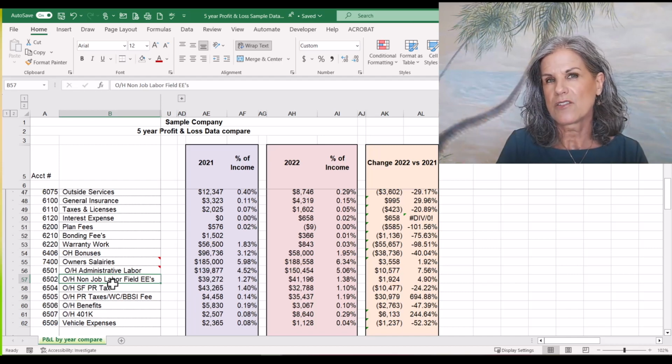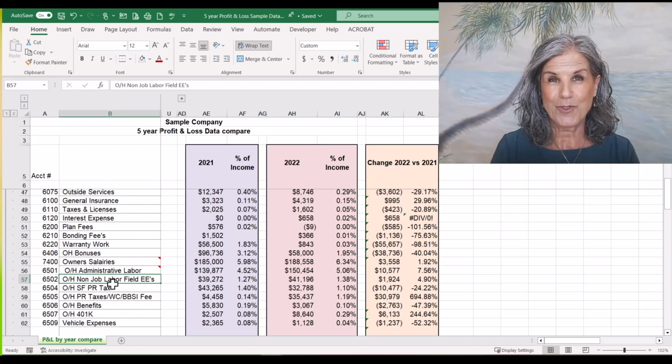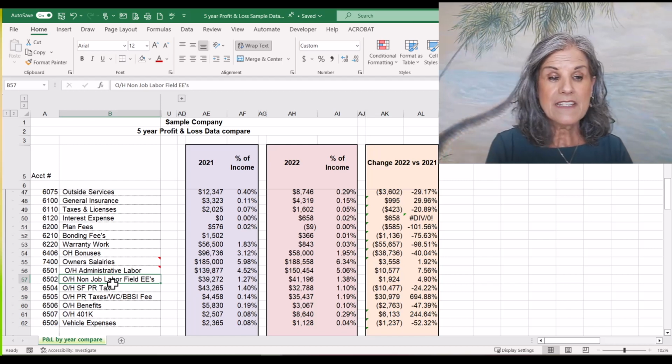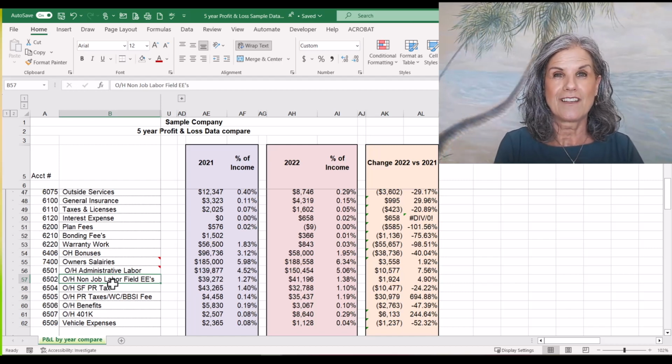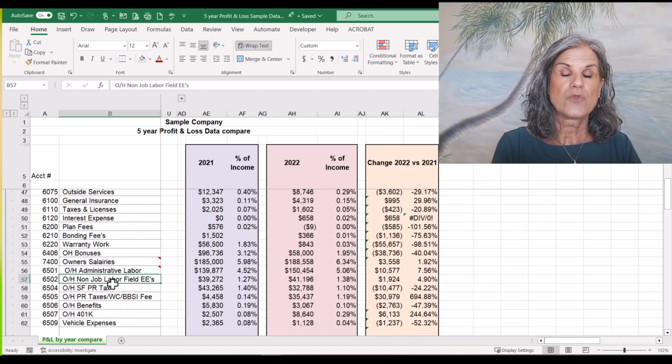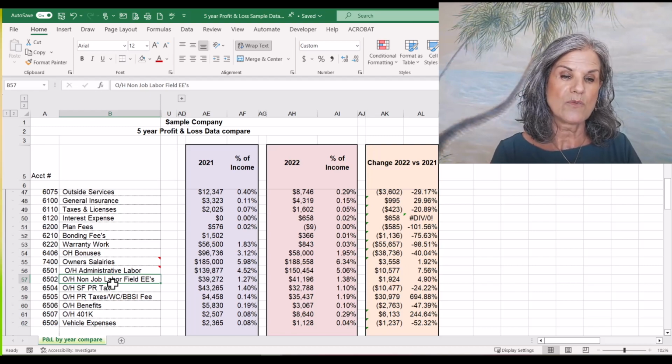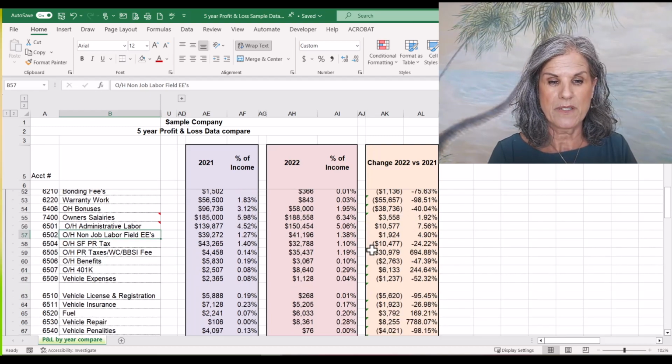Your entire cost for an employee, including all of those burden items, those are all chargeable to a job. Things like employee vacation and holidays, not so much, right? So you want to make sure that you have in your overhead a good idea of what it is really costing me to run my business.